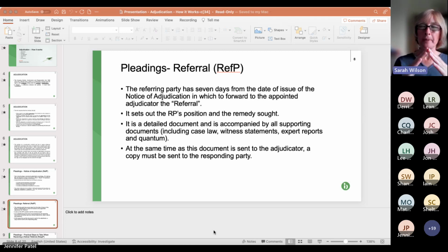So that's at the top of the pyramid. Next down, we have witness statements from the project team explaining what was on site, why we got behind programme to justify our extension of time, why we consider the work is extra work, it wasn't in the scope, all those things, referring to the project documentation, which I'll come back to.